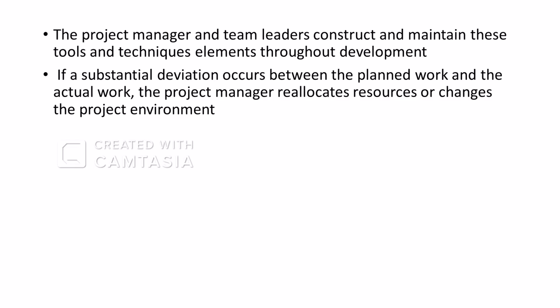The project manager and team leaders construct and maintain these tools and techniques elements throughout development. If a substantial deviation occurs between the planned work and the actual work, the project manager reallocates resources or changes the project environment to enhance the project progress.